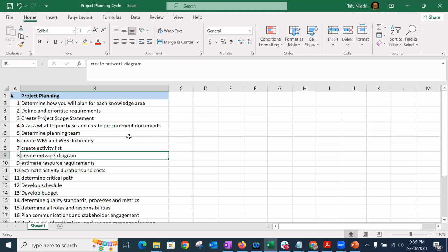So you will know that these are the activities. This is my diagram, how it looks with the predecessor and the successor and all that. So now you know the resources, how you can place them in each box of the network diagram. And finally, you can estimate the activity durations, the man hours, and once you get the man hours, you can also find out the cost, because you just convert the dollars spent per hour and all that, right?